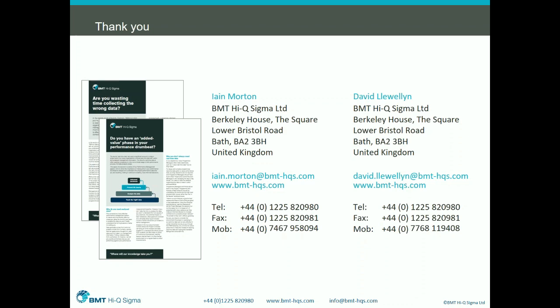And that was because of the sheer volume and complexity of the project, that was appropriate. If you had lots of smaller projects and not as complex, then you would obviously compress that timeline, maybe spread your project controllers and performance analysts across a wider range of projects and give it less attention because of those influences. Yeah, thanks. We'll do the last couple of questions.